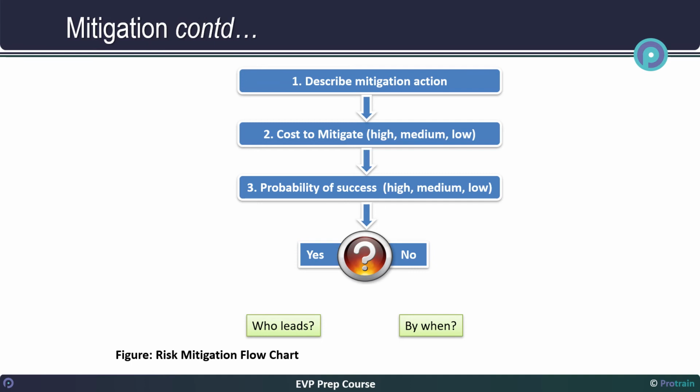If a particular risk mitigation strategy is chosen, then it would be helpful to describe items that, if mitigated, would be the responsibilities of a group, department, or individual. In other words, the responsibilities and actions for mitigation implementation should be defined. Finally, it should also be identified when the mitigation item needs to be completed, especially if the action is time-dependent.